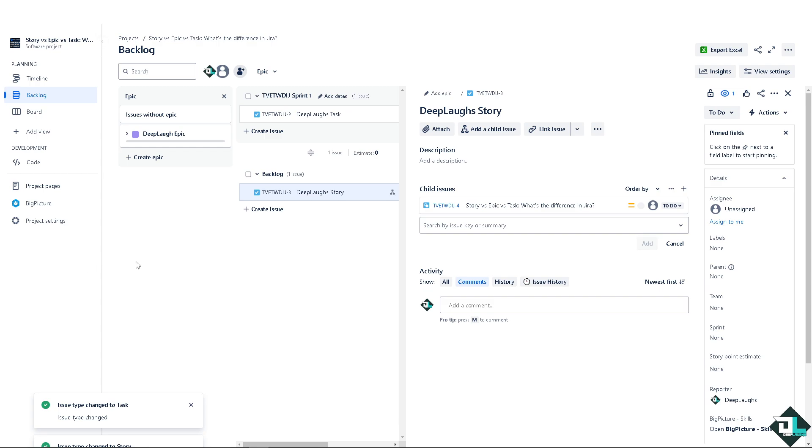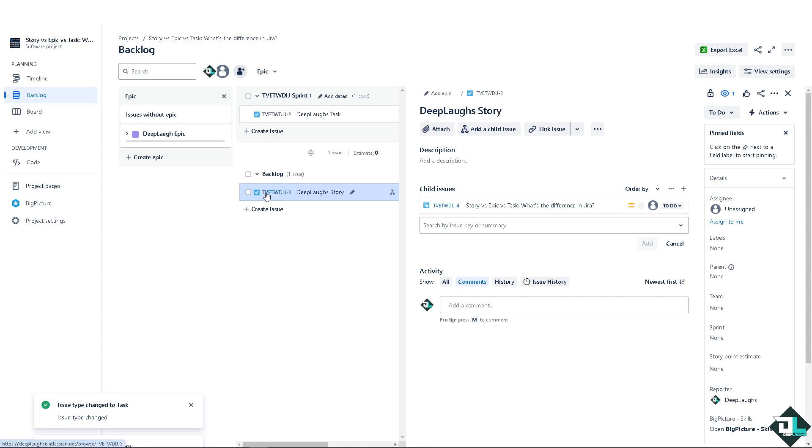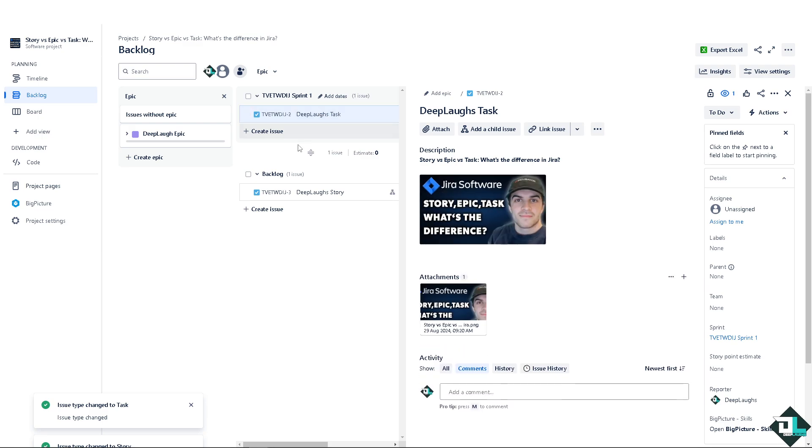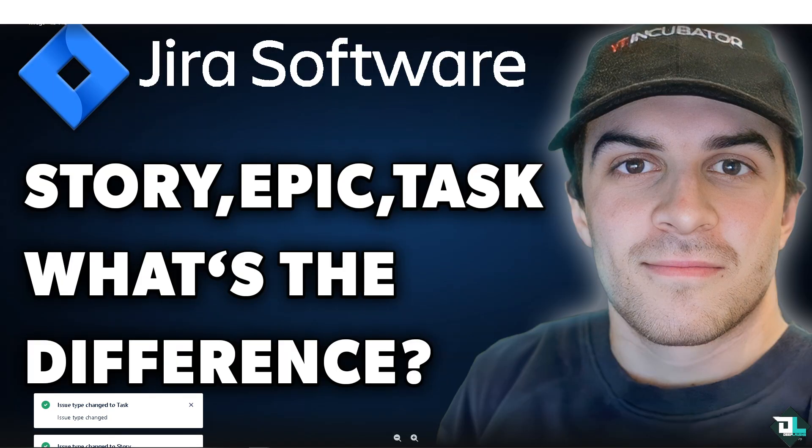The thing is, epics do not do that because epics are for bigger items spanning multiple sprints and containing stories and tasks. On the other hand, stories are more detailed and user-focused, representing a specific feature or requirement that provides value. Tasks are individual work items that need to be done, often technical or administrative, to support stories or epics.